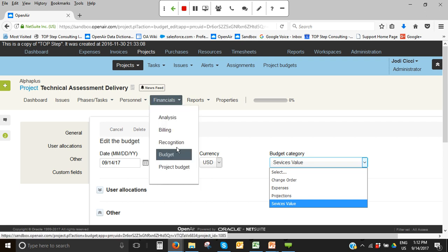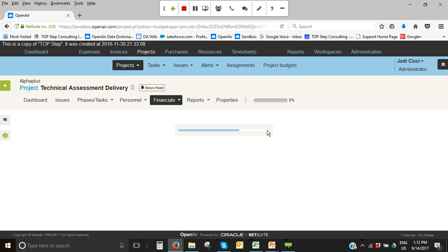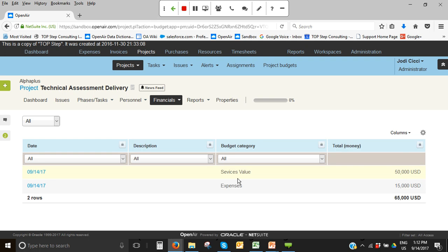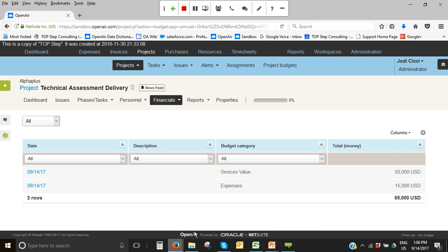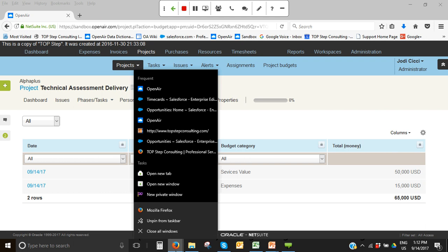So if I come here, okay. So you can see that I've taken that $65,000, I've added a little bit of intelligence, not much, but a little bit. So now I know that I don't have $65,000 in budget. I have $50,000 for time and $15,000 for expenses. Okay. And then what I can do is run reports that are a little bit more detailed, a little bit more intelligent. Sorry, let me get into that.